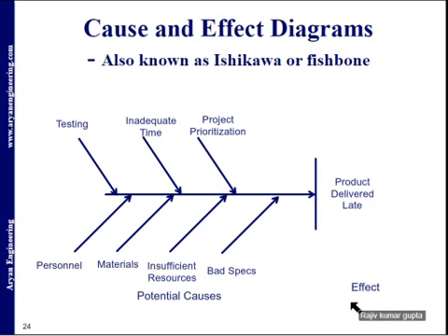Professor Ishikawa created cause and effect analysis in the 1960s. The technique used a diagram-based approach for thinking through all the possible causes of a problem. This helps you to carry out a thorough analysis of the situation. There are 4 steps to using the tool: identify the problem, work out the major factors involved, identify possible causes, and analyze your diagram. And you will find the method is particularly useful when you are trying to solve complicated problems.